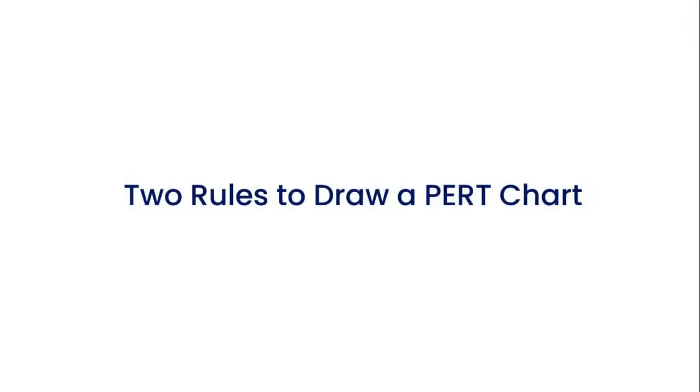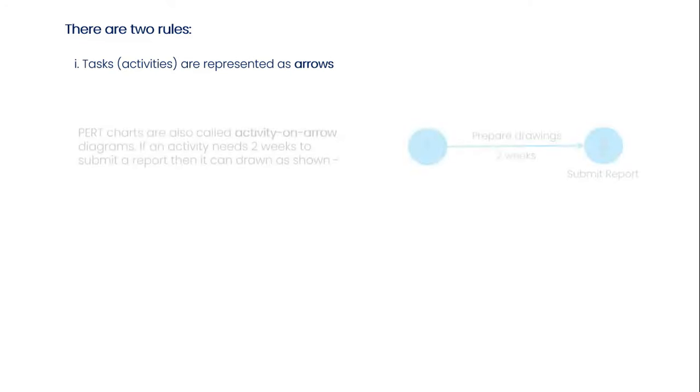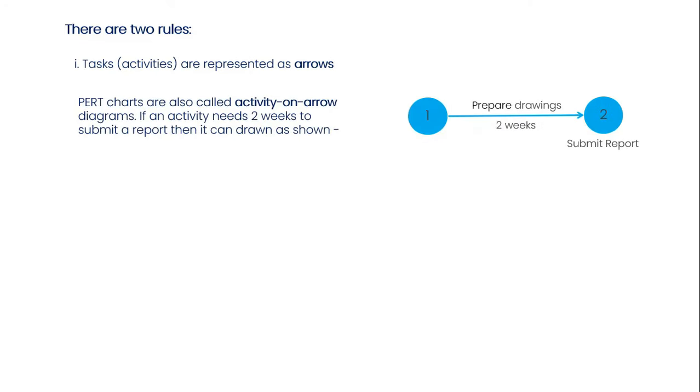Before you start a PERT chart, you need to understand the two rules. The first rule is tasks are represented as arrows. PERT charts are also called activity on arrow diagrams. If an activity needs two weeks to submit a report, then it can be drawn as shown.